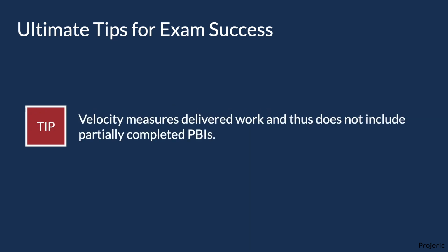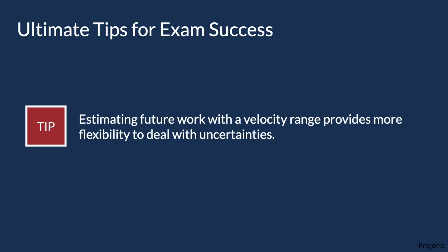Velocity measures delivered work and thus does not include partially completed PBIs. Estimating future work with a velocity range provides more flexibility to deal with uncertainties.